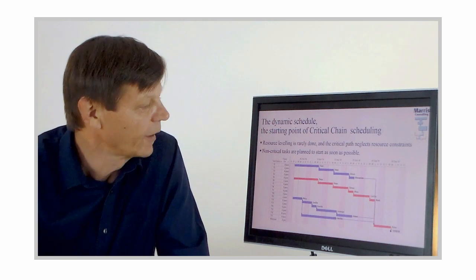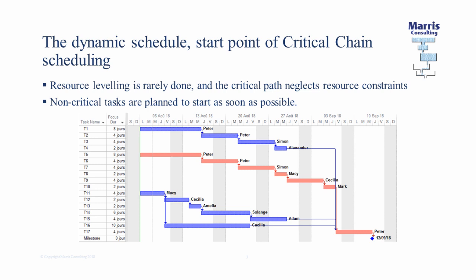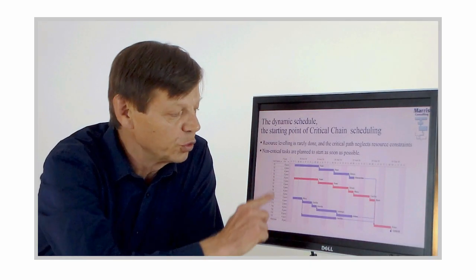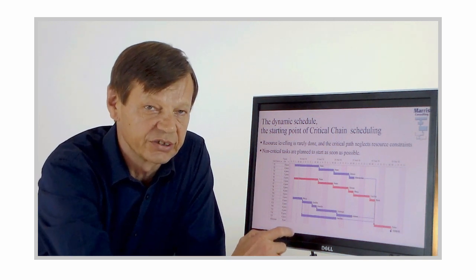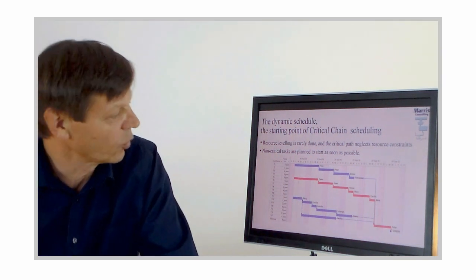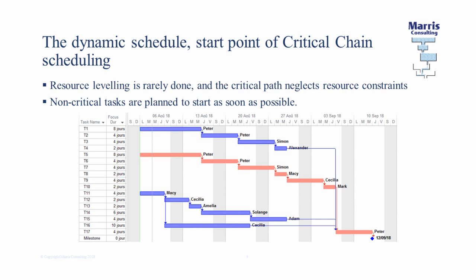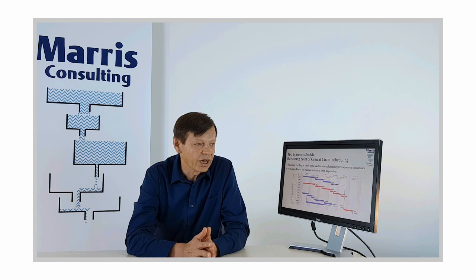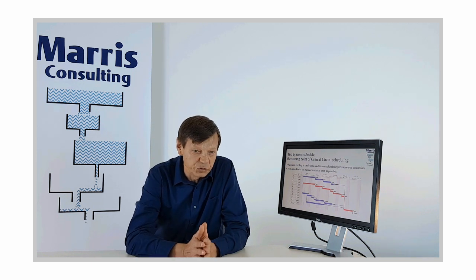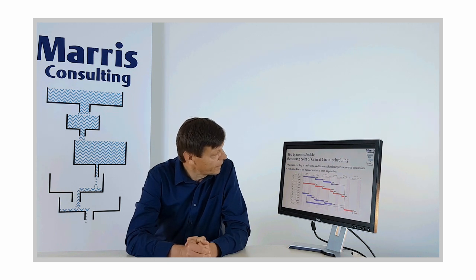It's all full-time. Obviously, the sequences of interdependencies are identified, and furthermore, there are no fixed dates anywhere in the schedule, hence the name dynamic. We haven't put any fixed gates or tried to pin anything down in time, right? It's free to float, it's dynamic. Okay, so that's already a pretty good schedule, and in fact what I've just said we encourage you to use even if you're not using critical chain in standard scheduling.